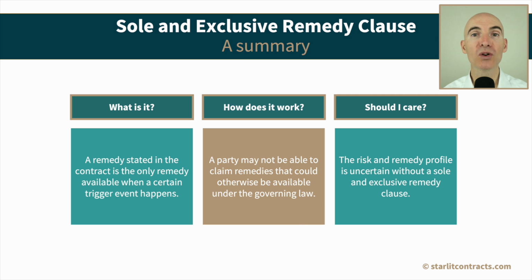It's common to see sole and exclusive remedies clauses inserted several times in a contract. So for example, you might have a general statement in the contract that all remedies described in that contract are intended to be sole and exclusive, but you might also see this statement specifically under the warranty obligations and under any arrangements for the payment of liquidated damages or penalties.